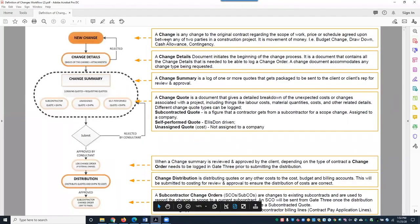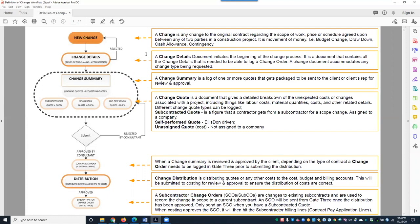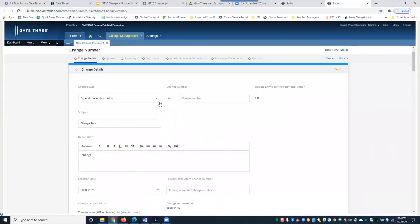A change is any change to the original contract regarding scope of work, price, or schedule agreed upon between any two parties in a construction project. It can be movement of money — for example, a budget change, drawdown, cash allowance, or contingency. Change details is the document that initiates the beginning of the change process; it contains all the change details needed to log a change order and accommodates any change type request.